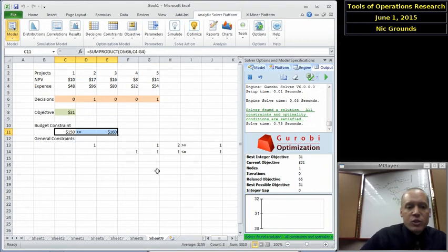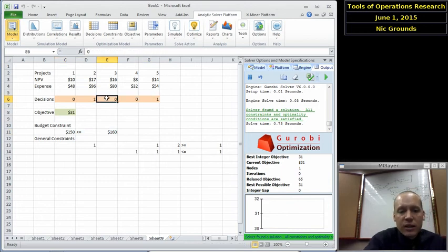So doing 5 is contingent upon doing project 3. Now this one's a little more tricky to represent and a little less intuitive to think about. So for example, if we chose project 3, we could choose project 5. We wouldn't have to, but if we were doing project 3, we could do 5. However, if we don't do 3, we can't do 5.